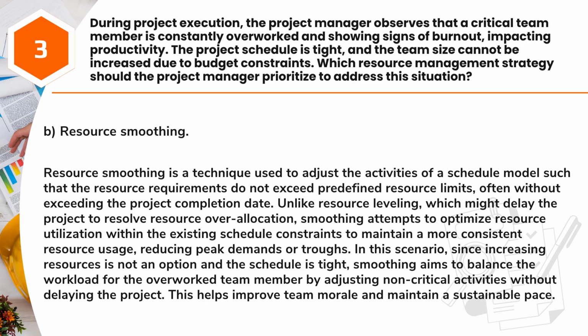In this scenario, since increasing resources is not an option and the schedule is tight, smoothing aims to balance the workload for the overworked team member by adjusting non-critical activities without delaying the project. This helps improve team morale and maintain a sustainable pace.